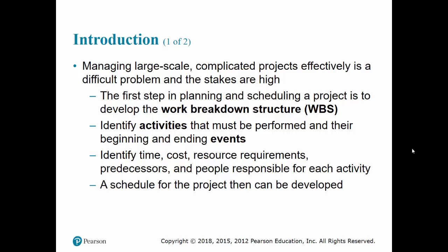So you see, even in a fairly straightforward project like building a house, you have a variety of activities requiring a diverse set of skills and diverse set of technologies, and they all will have to be arranged in a particular order. There are some predecessor and successor relationships. You cannot start site preparation before the plan gets approved by the municipal authorities. You cannot lay the foundation before digging for the foundation. You cannot build the second floor before you build the first floor, that kind of thing.